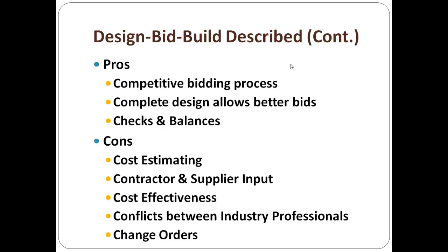Then there's change orders. Change orders come from one of three sources: the government, local government, the church, which is where the largest number and most expensive change orders typically come from, and then aberrations in the architect and engineers where they had a mistake or an overlap or a conflict or an invasion, where the plumbing and the electrical ended up taking up the exact same cubic feet, and you've got a change order that comes about to move them around. Now that's a typical one that has been a part of the industry, but not a very expensive one, but there are other ones. So if you don't have all the players involved during the preparation, planning, and design, then you get to the construction and you have these negative parts here.